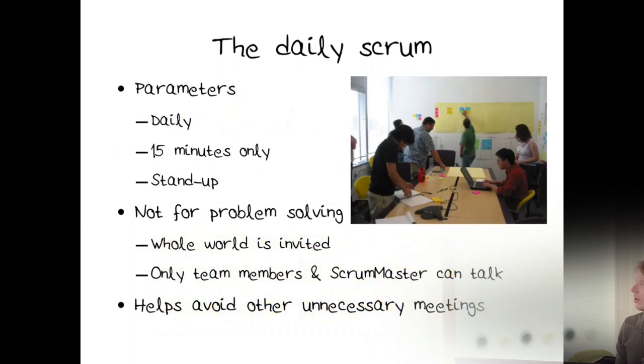The daily scrum is a 15-minute meeting. It's a stand-up meeting. The meeting is not for problem solving. You're not allowed to solve problems in this meeting. Problems will pop up in this meeting. They will surface. You discuss those after this meeting.